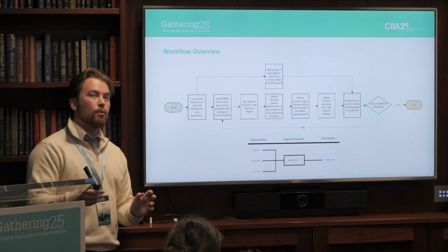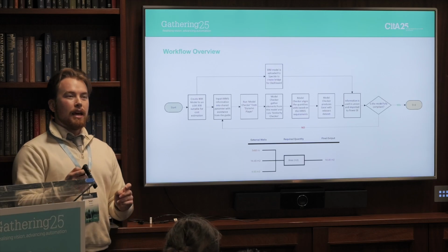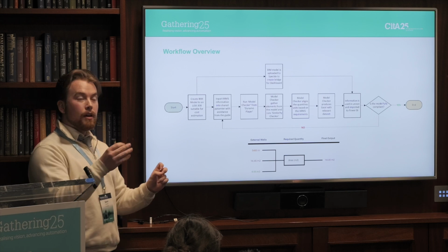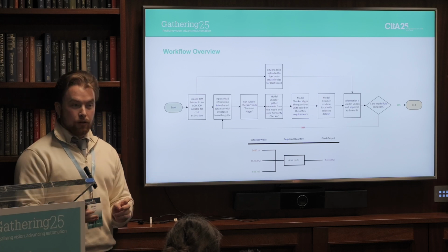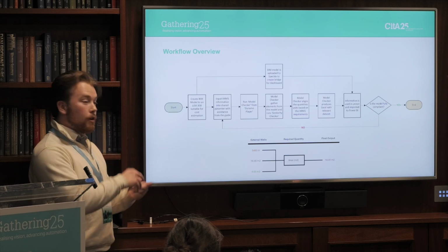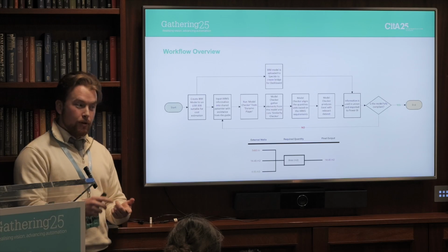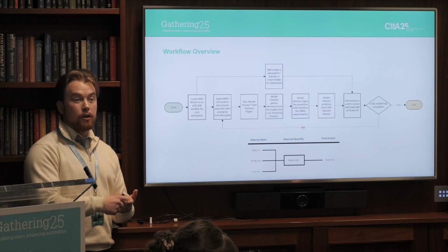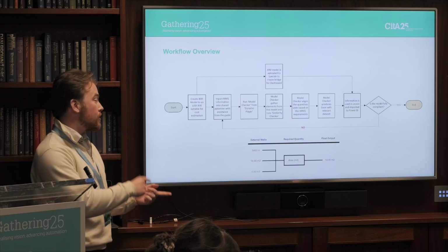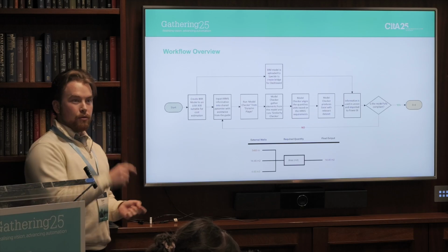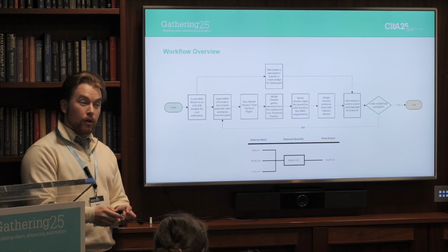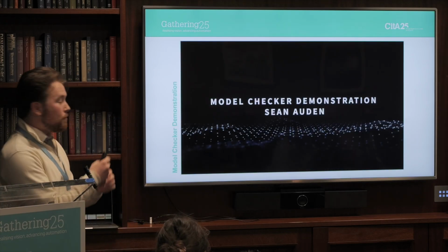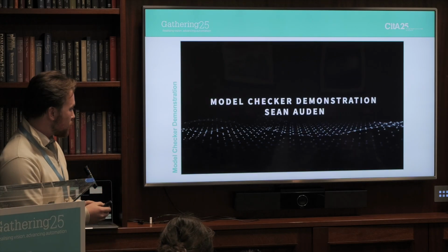What I mean by that is if you have a wall and in the ARM5 you only need the square meter. For a wall, you can pull linear dimensions, you can pull meter squared, you can pull volume, but for costing, you may only need one of them. So the idea behind this was that while it's going through everything, it's only pulling the one quantity that a QS really needs for this specific application. So this video will better explain it, I suppose.